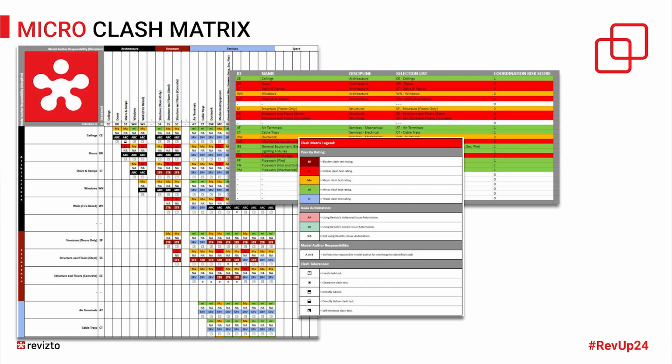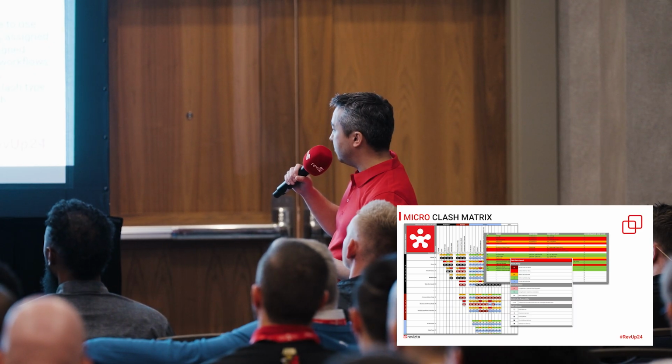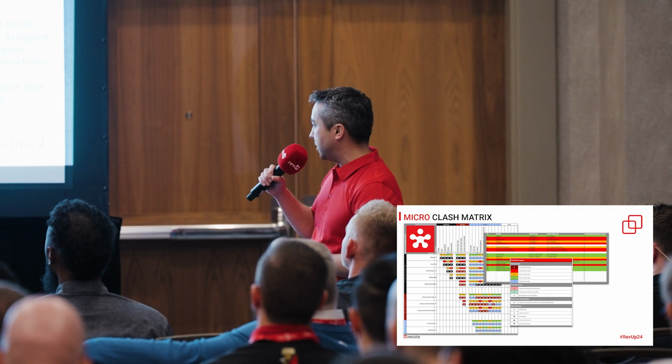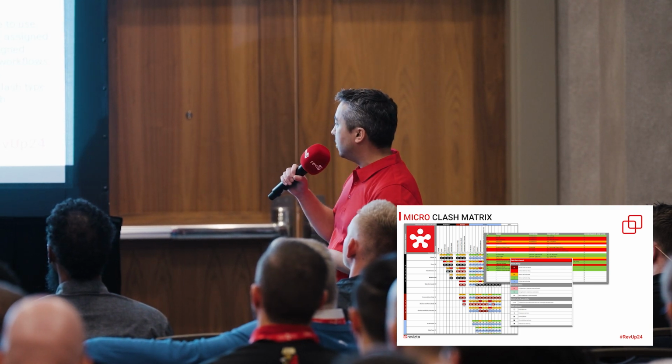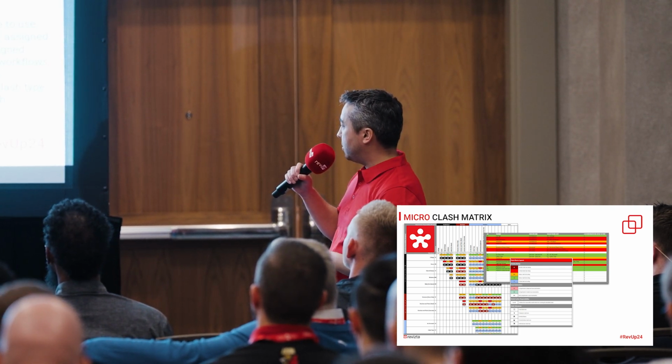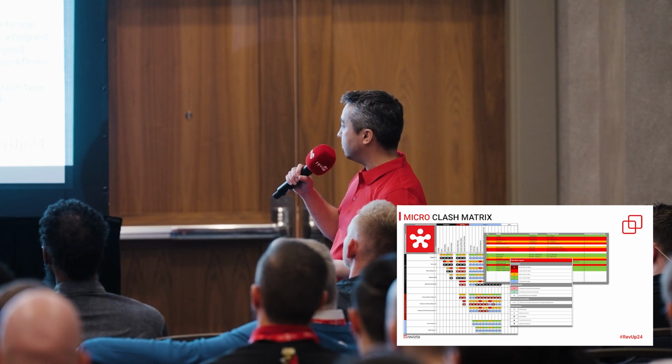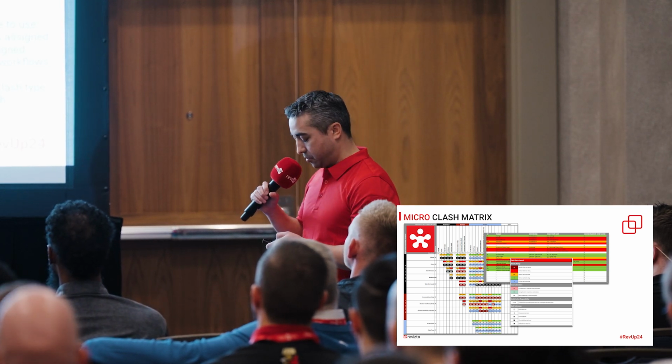So structural steel versus mechanical, very simple, straightforward, to the point. But these could be very specific workflows, or maybe you want to create a particular clash type test that might not work if you pack too many model files in it. So this, like a 1.5" clearance clash type, which you can create, might be very applicable on steel versus mechanical, as an example.